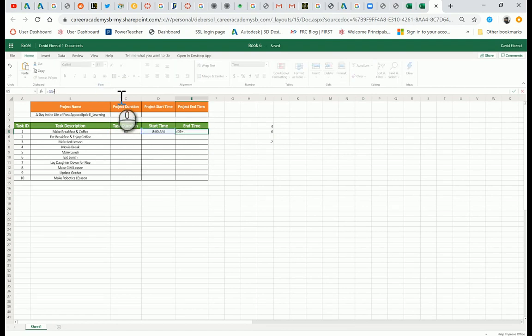So I'm going to say my original start time, which is D5, plus TIME. Now TIME wants hours, comma, minutes, comma, seconds. Well, I don't want to add hours. Everything I'm going to do in here is going to be in minutes. So 0 hours. Now the minutes is going to determine what is in here. As long as I'm always using my actual minutes, not like 2 hours, I'm going to say 120 minutes. So 1 hour would be 60 minutes. I'm going to actually use C5, that cell, comma, 0 seconds.